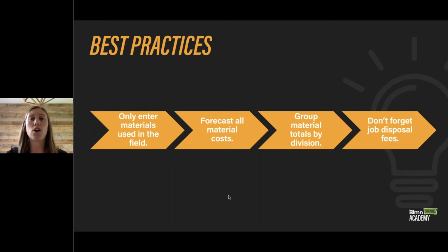And don't forget job disposal fees. For example, if you have a bin on a job site, you're charging the customer for that bin on the estimate. This is where you will want to include those job disposal fees right within your material budget.